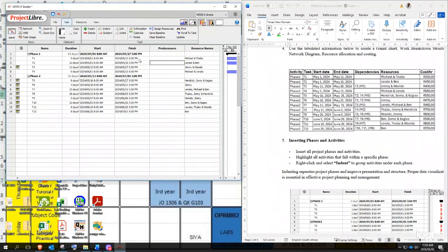Okay, so our milestones, right? Basically, this relationship T1 and M1, I'll repeat for the second time, means M1 depends on T1. For you to reach M1, you must have completed T1. So that's what it means. Hence they are called dependencies. So this depends on T1 for it to happen.